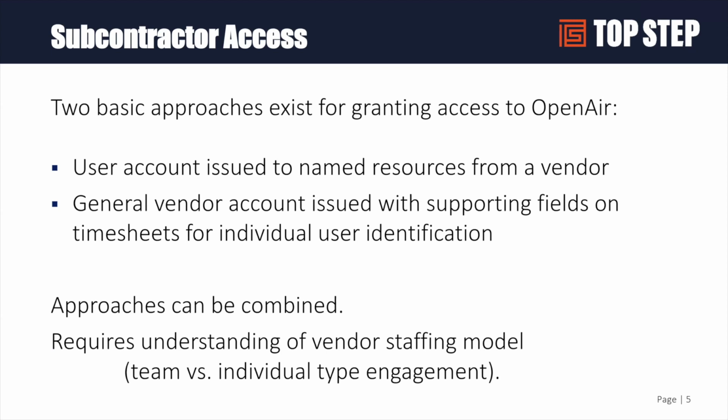So basically there are two different approaches we see with subcontractor usage. One is, we brought in a subcontractor, we're going to set him up with a user license, and he's going to basically enter time and behave the same as our employees. So set him up, give access to projects and tasks, and then they'll enter time at the same cadence as your employees. That's pretty typical when you have a small amount of contractors, or if you have contractors that are critical to the execution of projects, and you want to be able to manage them just like you do any other employee record.